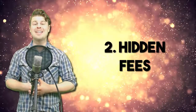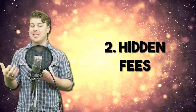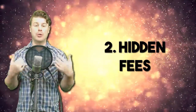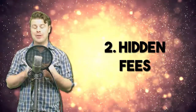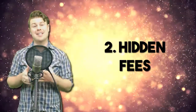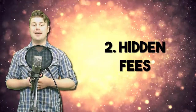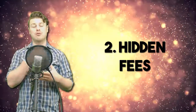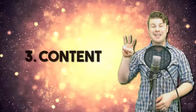Number 2, hidden fees and charges. Now, every website design agency and sole trader works a little bit differently in this space, so make sure it's clear right from the onset of the project what is included and what isn't in the scope of the work. So is there Google Analytics included? Is hosting included? Is domain name registration? If it's an e-commerce site, is there SSL? Is there SEO planning, intentional SEO planning done? Make sure these things are understood by yourself and the developer, as well as written into your contract so that you can manage expectations.